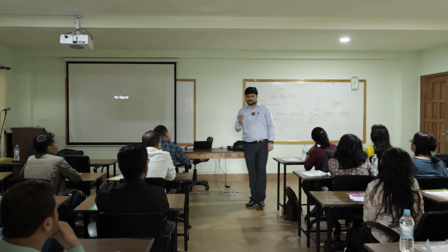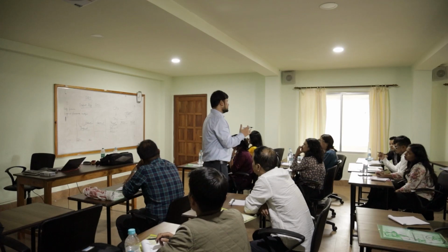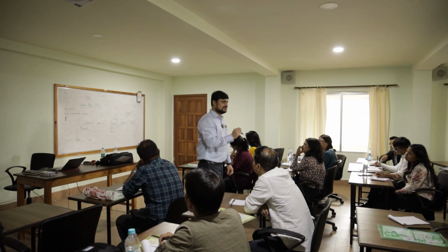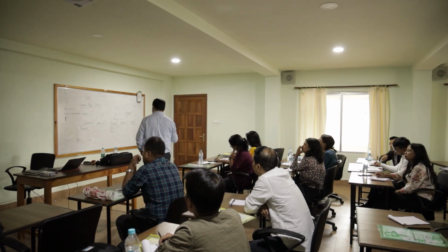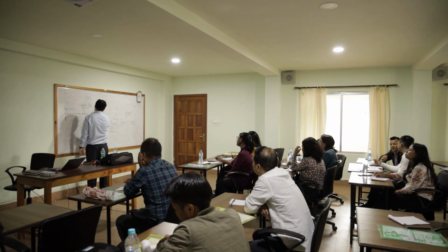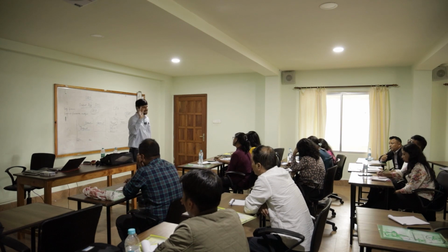Now what happens? The project implementation plan focuses on how to implement the program with all the challenges and constraints. So it is more focused on implementation. For all the World Bank assignments, you would always find a PIP also in place. Again, this is a document that runs into 50 pages, 100 pages and all of that.